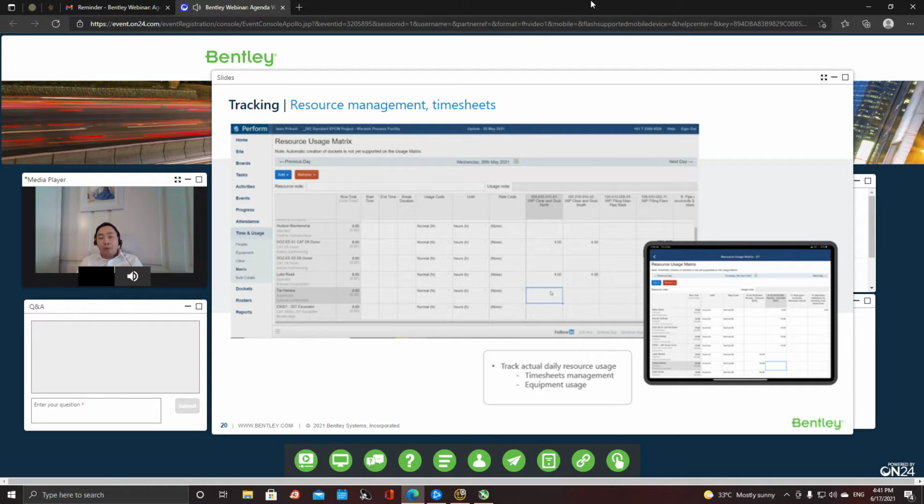So you are basically allowed to share equipment. What you do in Syncro is create timesheets. Your resources would be the equipment name, right? And then you simply log the time you used the equipment for different cost accounts. If you put the resource as a person's name, which is a human resource, you can really use this for your timesheet reporting. Now, maybe your company already has a timesheet system, but feel free to take a look at this because these are included in your subscription with Syncro 4D.